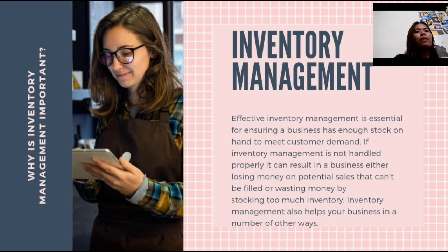Next is to meet the demand during the replenishment period. The lead time for procurement of materials depends upon many factors like location of the source, demand, supply, and more. So, inventory is maintained to meet the demand during the procurement or replenishment period.